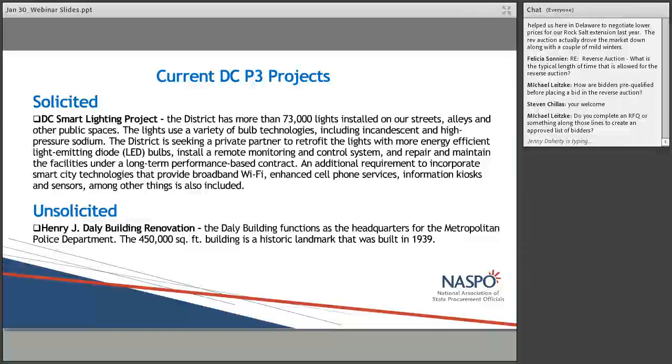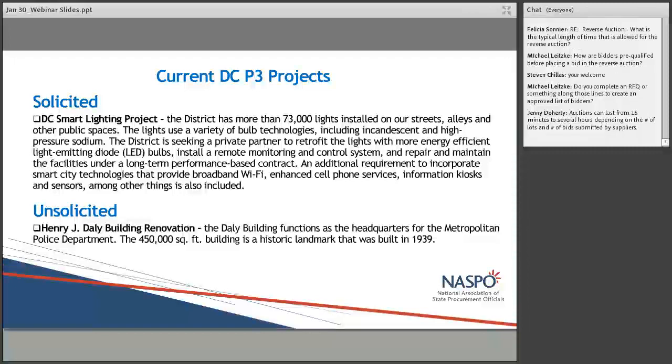At the RFQ stage, with the help of our financial advisors, we're evaluating financial viability. Again, the requirement is not completely fleshed out, so cost is really not a determining factor for evaluation at that time. But whether you have experience, have the equity, have the financial capacity to actually carry this project forth and maintain it, again, for the long period of performance we're looking at, which can sometimes be 30 years, to design, build, operate and maintain it, and then deal with the availability payments.